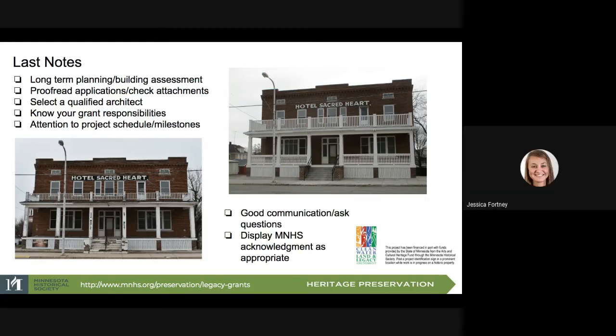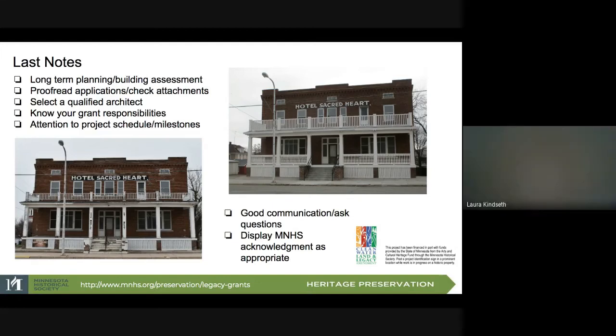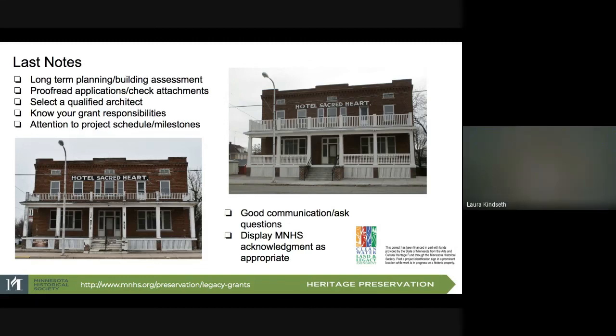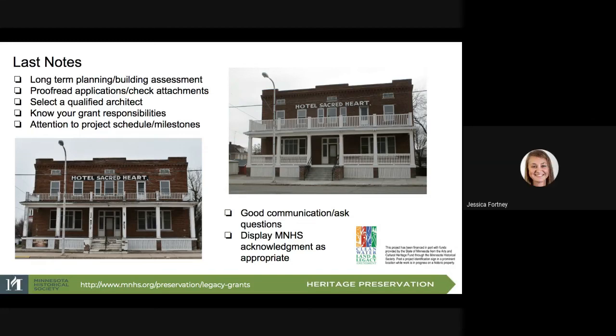And then I have another question about adding contingency in. The 10% is great. Does that go line item by line item, or should there be a separate line item at the bottom that just says contingency in it? It's just a regular line item. Just be sure it's clearly defined as contingency. Okay. So it will figure in your total request. Perfect. Yep.